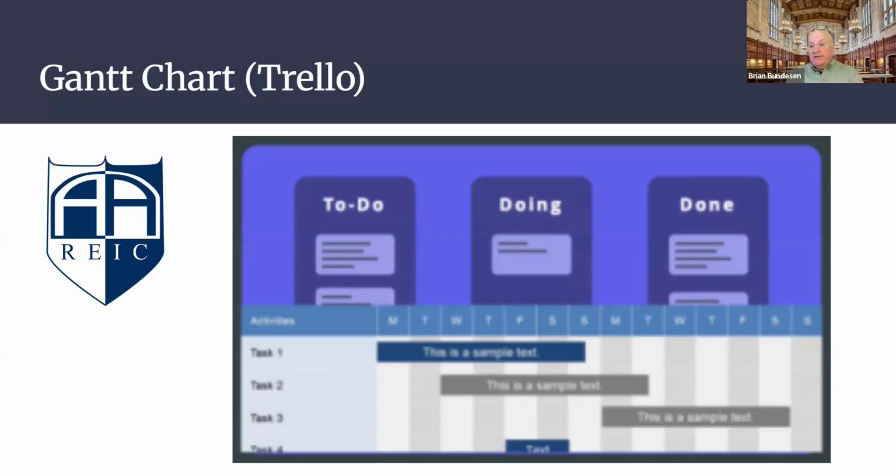And this is keeping your contractors accountable. And there's a guy in the group who says, when he hires a contractor as part of the contract, he's going to say, look, I want you to text me at 5 o'clock every day, and tell me, are you on the timeline or not?